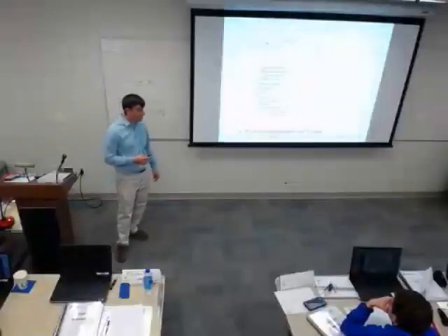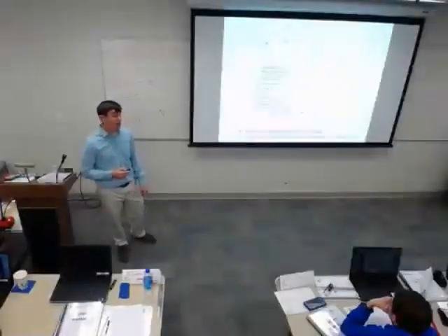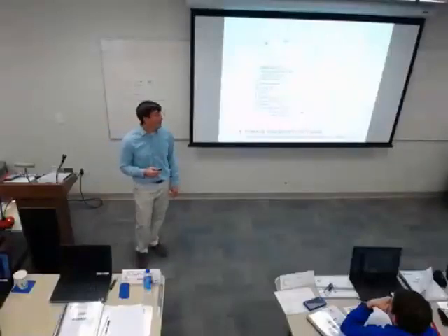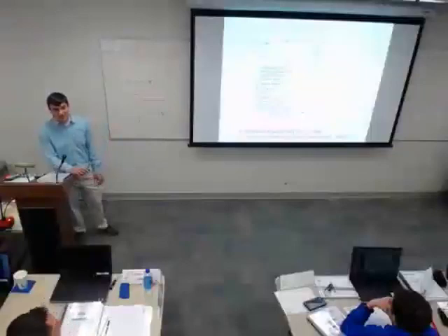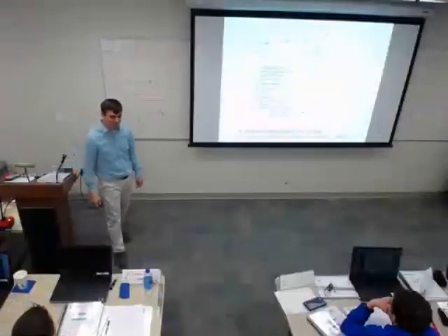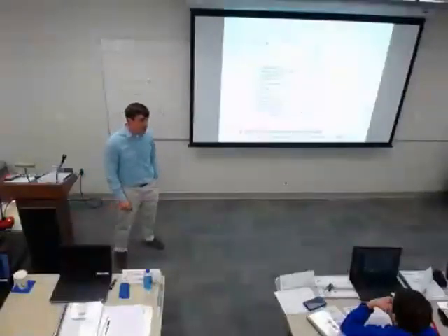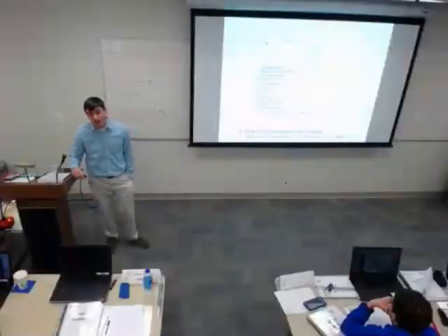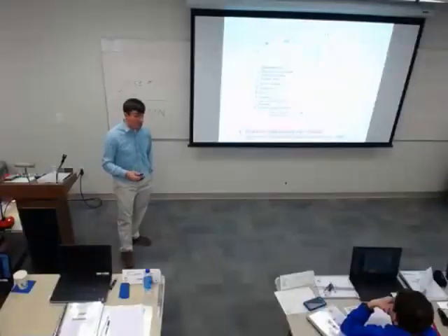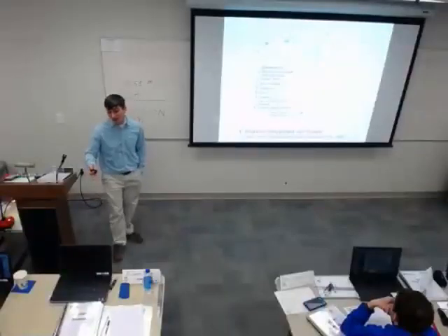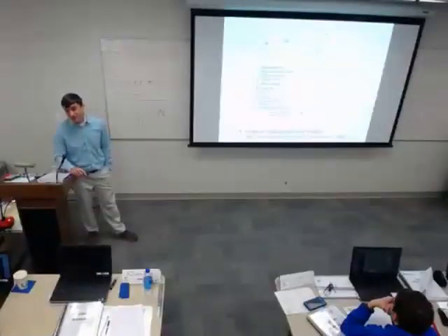They put 15 foot of flex on the end instead of 5. The whole thing was undersized. We're still trying to figure out what we're going to do, actually. You pay for it and the designer's off the hook. That's right, use your contingency and pay for their mistakes. Unfortunately, yep. I mean, we messed up when we put it out wrong. We own it at that point. And again, the point being, it may not be the TAB guy's fault. Often is, but it may not be.